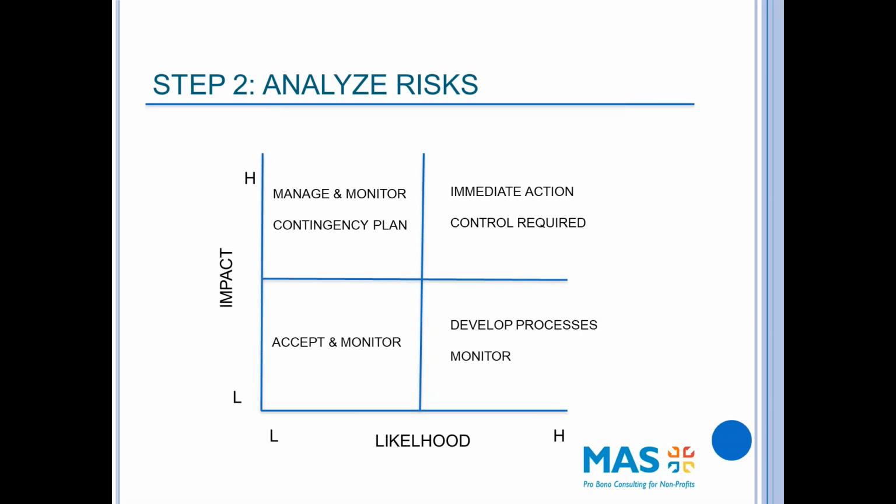If there is a high likelihood it happens and it has a severe impact, then from a governance and management perspective, you need to step in and figure out how you control those risks, and what you can do that either lowers the likelihood it will happen or lowers the severity of the impact.